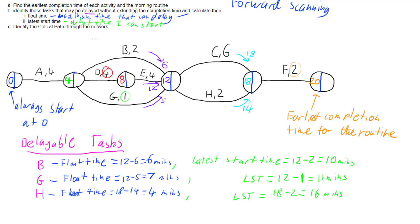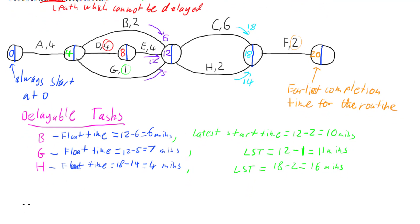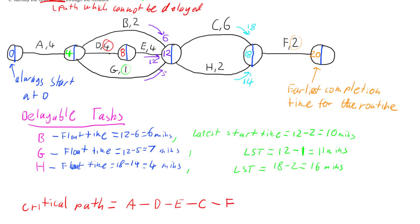Now lastly, we can determine the critical path - the path which cannot be delayed. What is the path through the network that we must stick to? My critical path is the path that doesn't include any delayable tasks. I have to go through A, then through D and E because I can't delay those. I can delay B and G but not D and E. Then I have to go through C, because H was delayable. And finally F, because I have no choice. That's my critical path.